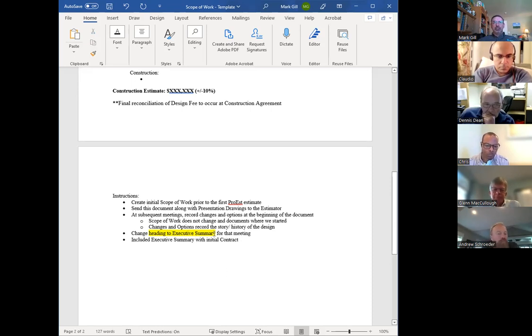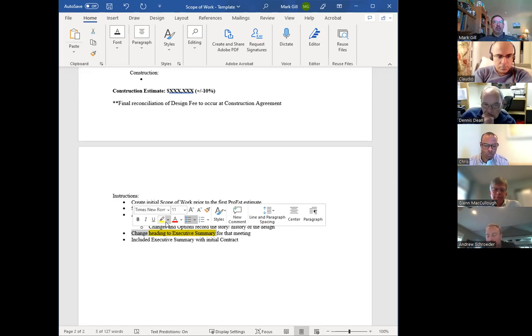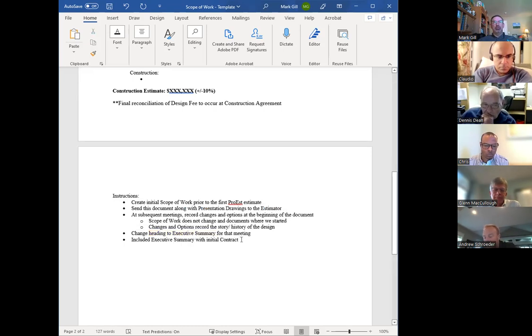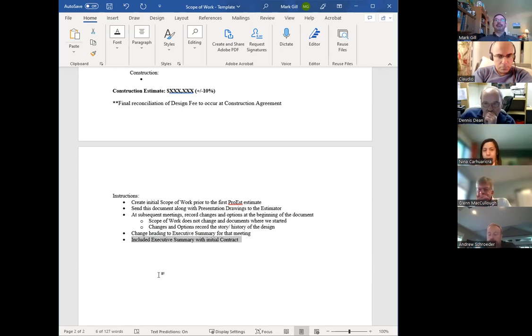And just to remind everyone, one thing that sometimes gets missed, but is hugely important for a lot of clients and really smooths the process: not only do we use executive summary at the executive summary meeting, we use the executive summary when we present contracts. It gives the client a quick summary of, we talked about this at executive summary, made a bunch of decisions. Now we're at contract. Here's the summary of the decisions we made, the cost impact of them, and then they can go read the contract, right?